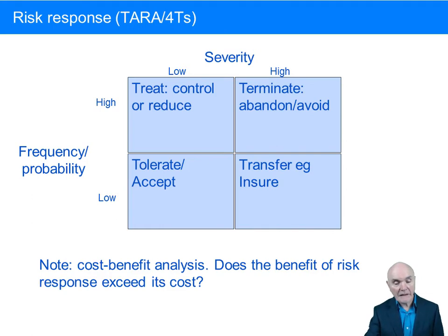I think on this slide, just watch, we have the things a different way around. In particular, I think we've swapped these two around here, the high and the low. It doesn't matter, you can see them drawn anyway, but if we have something which is highly likely and highly damaging, then one of the ways to deal with that is to terminate it, to avoid it.